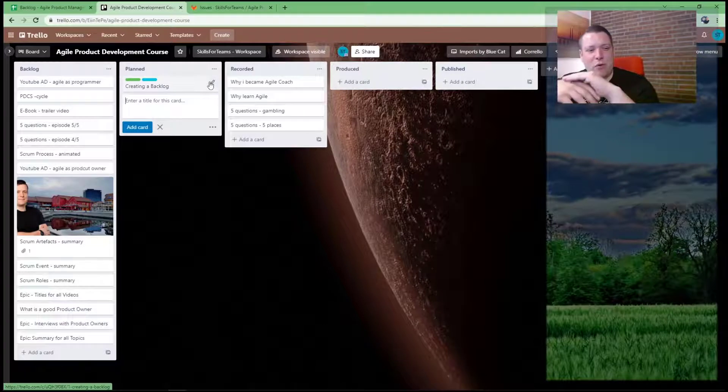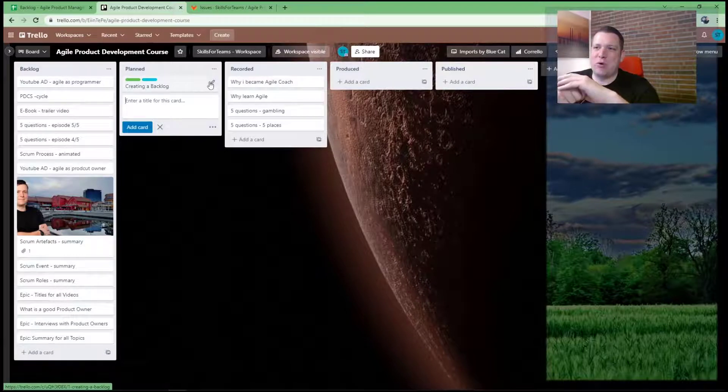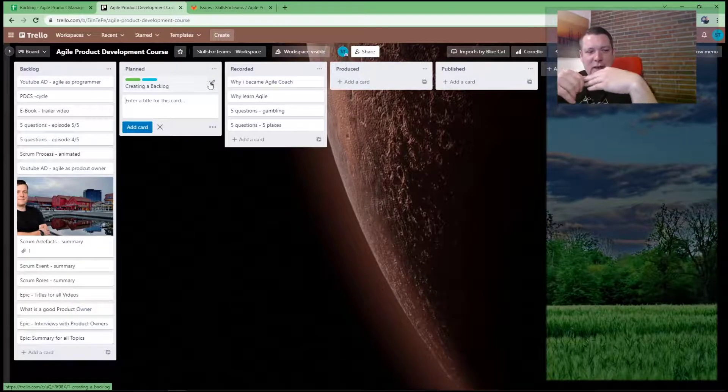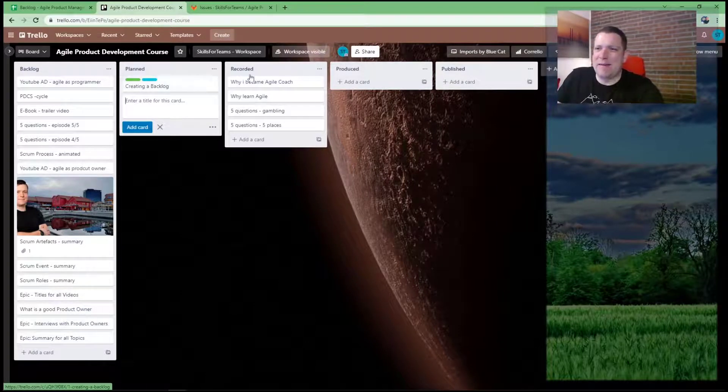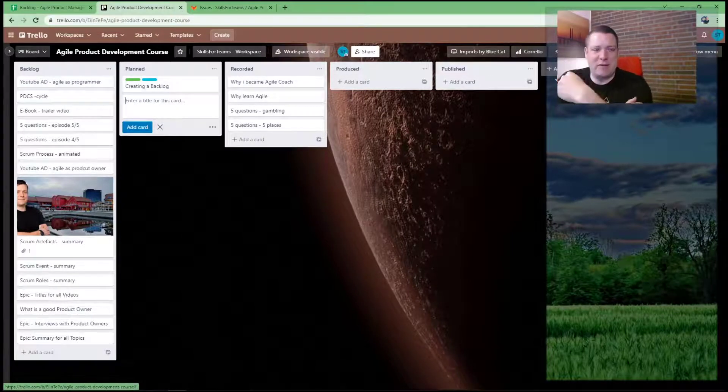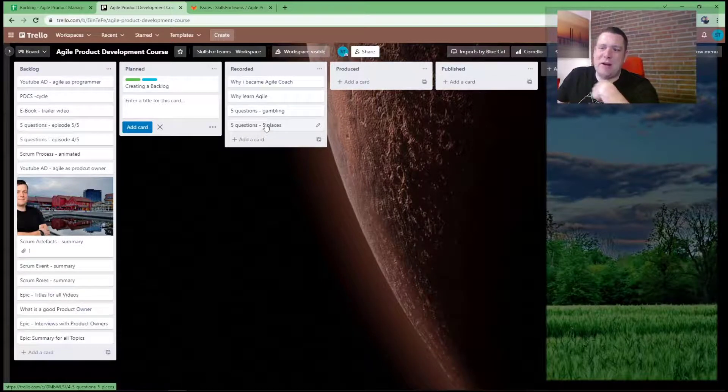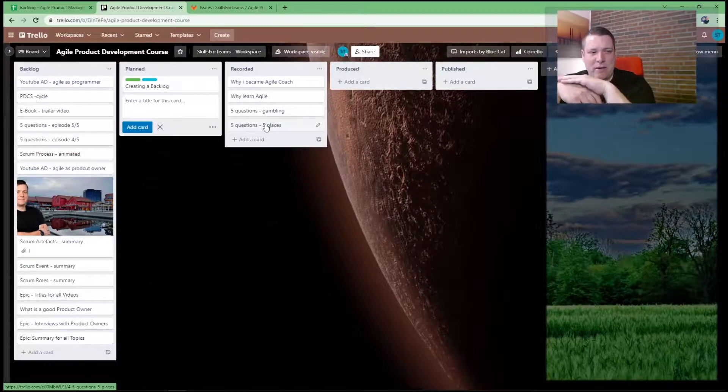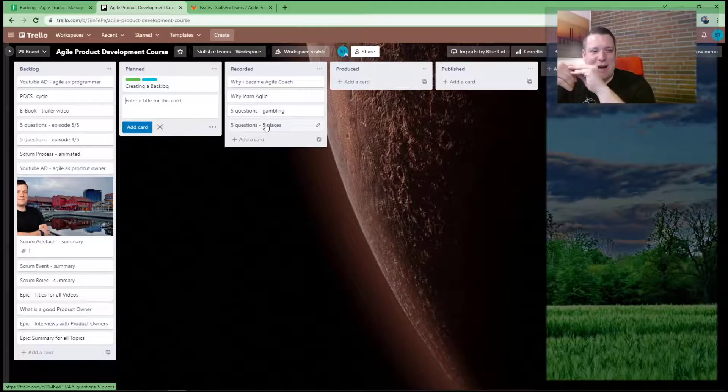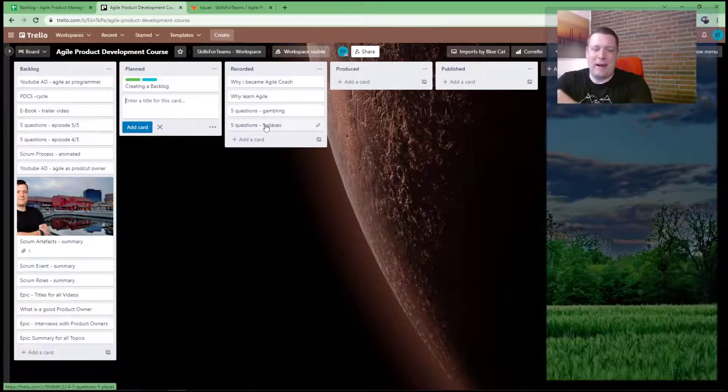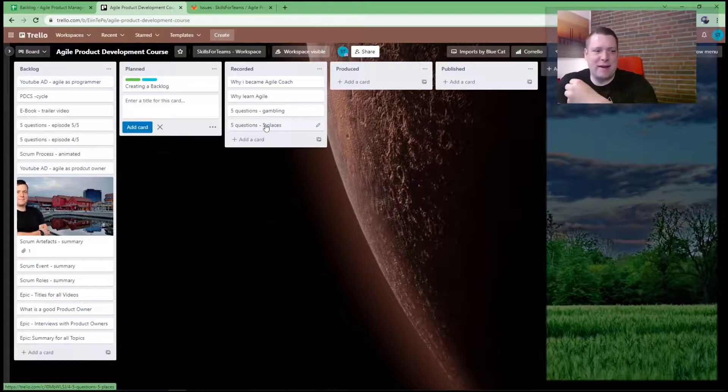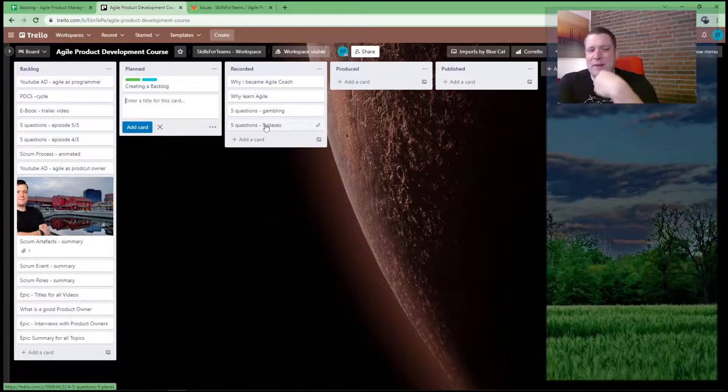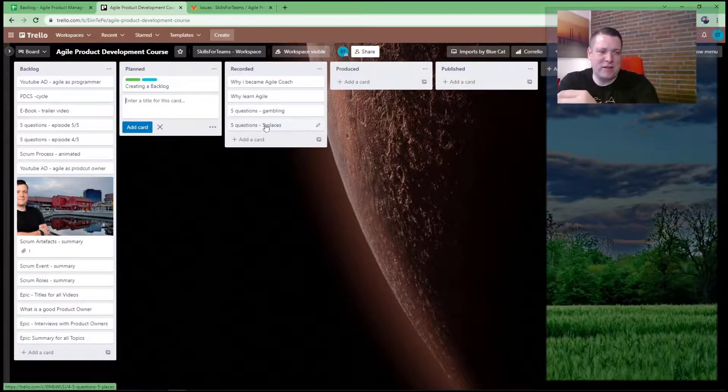Let's first focus on the workflow. Trello is a Kanban board and it has mechanics. Like I told you, like the work in progress limit, but you also should take a look on cycle time. Like the time it needs from here to here. And if the cycle time is too long, the feedback is getting too slow. So for example, this video I have to record, I've recorded it three weeks ago or two weeks ago. And I didn't check it up because I was out again to record new stuff, shoot new videos. And now I did not cut it. And I don't have the feedback of the video. It would be actually cool to have it in a shorter way so I get faster feedback.